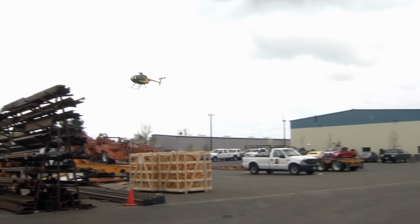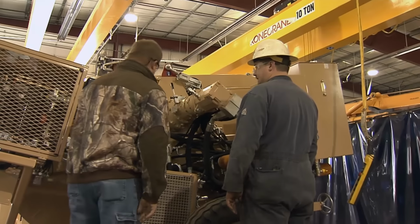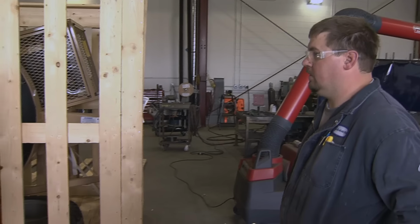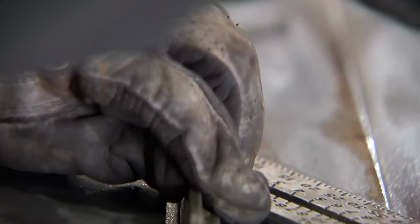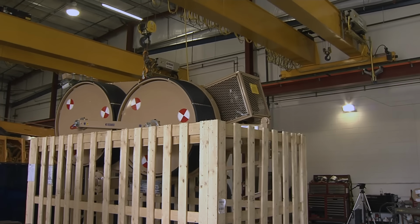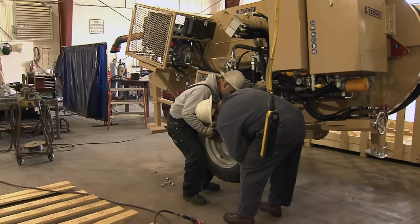In the meantime, down in Canby, Oregon, Wilson has begun their own massive preparations to be on site next year in January of 2009. Smaller, powerful specialty wire pullers and tensioners have been found in Italy that could, with some serious modifications, be flown by medium-lift helicopters. The new accelerated timeline doesn't give the Italian manufacturer time to make these modifications, so the units have been shipped to Canby, and Wilson's fabrication shop has gone to work to turn them into modularized units that meet the weight requirements.